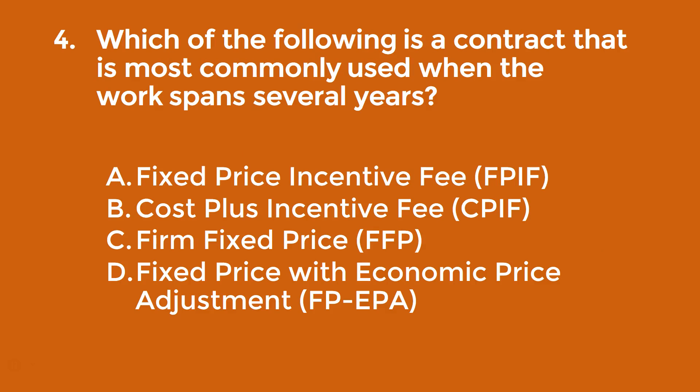Question four: which of the following is a contract most commonly used when the work spans several years? The correct answer is D — fixed price with economic price adjustments. In these contracts, payments may change over time to align with some reliable financial index, which is one of the reasons why it's useful when the work spans several years.